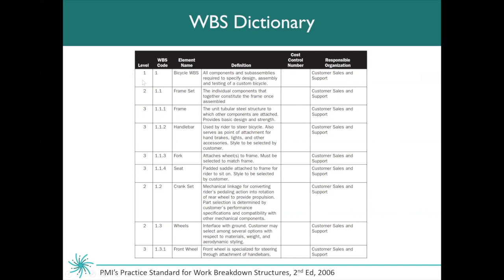So again, level one is the project level, then level two — for example, frame set — and then we break down into level three for each of the components. This is what a WBS dictionary looks like and it can easily be created in Excel.